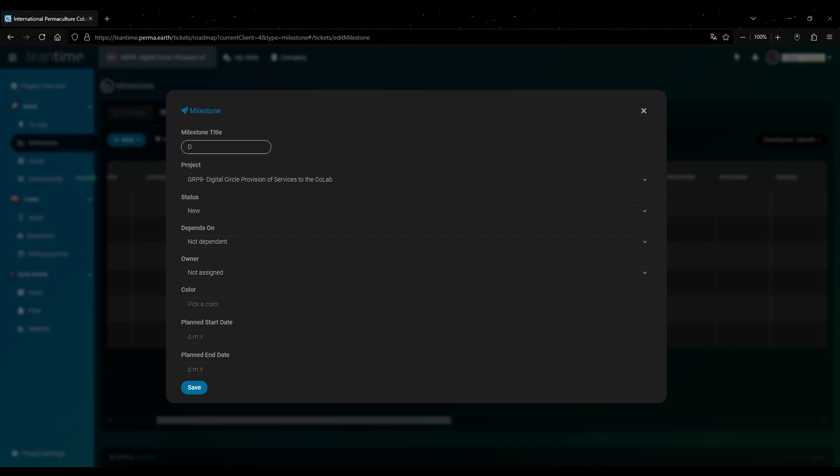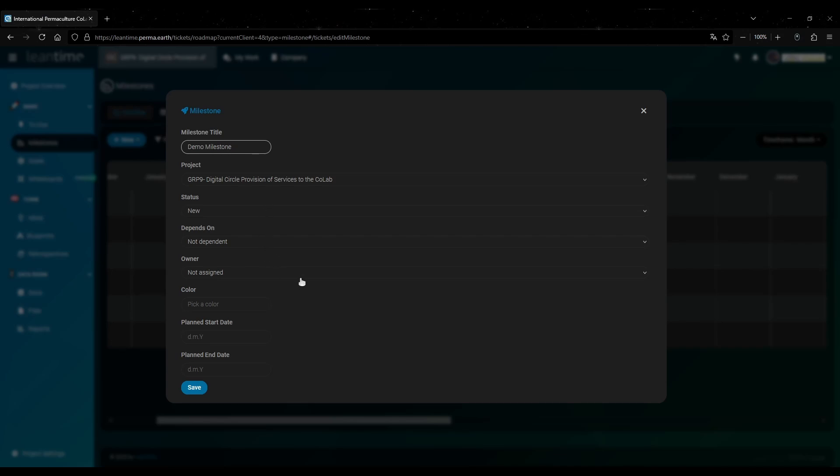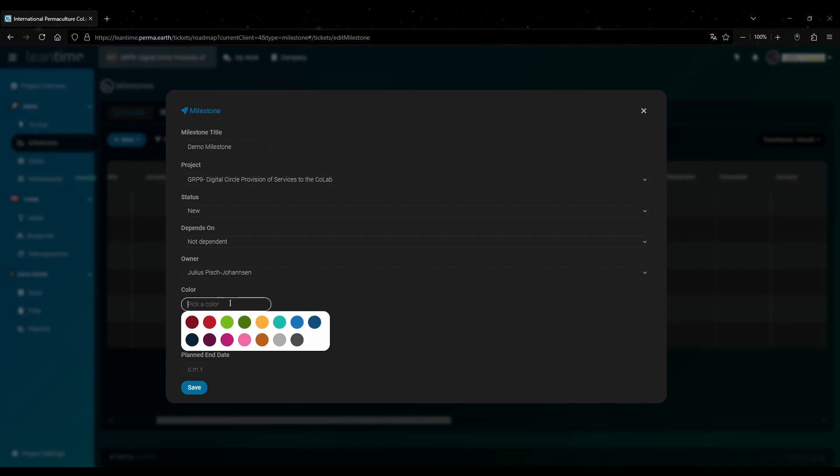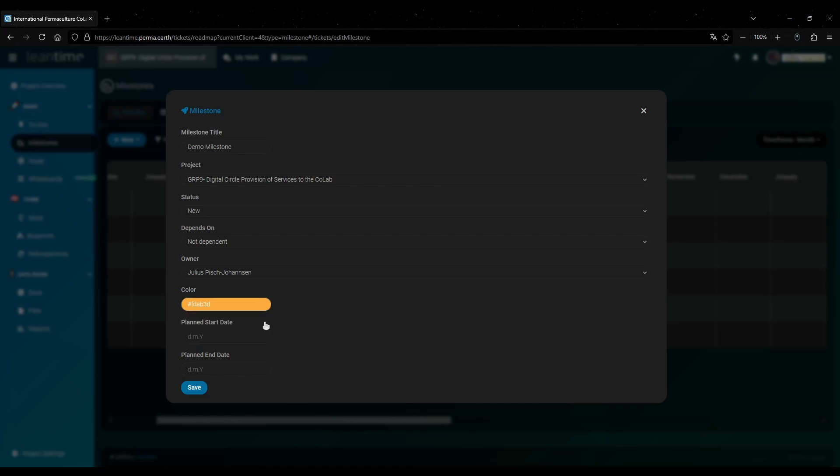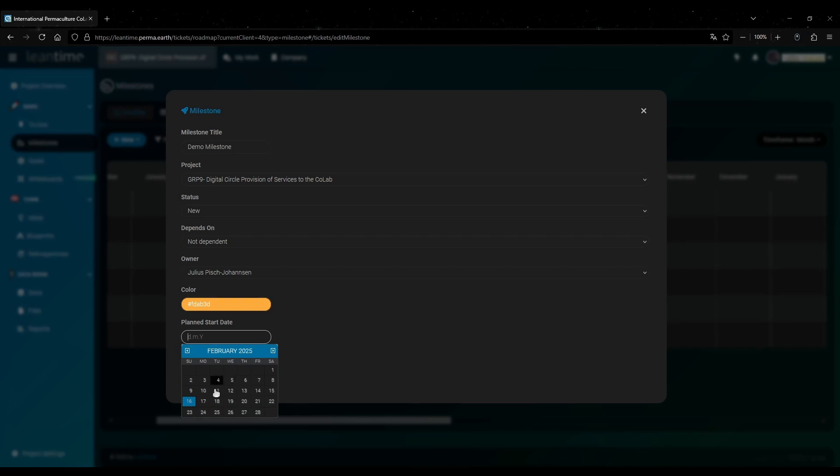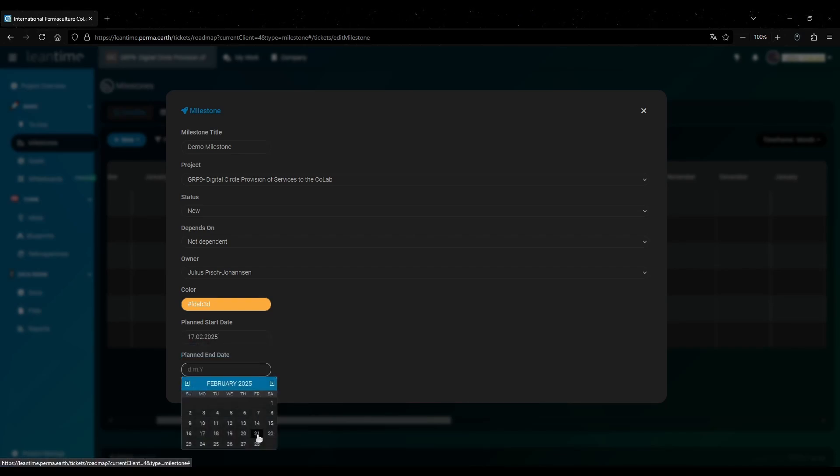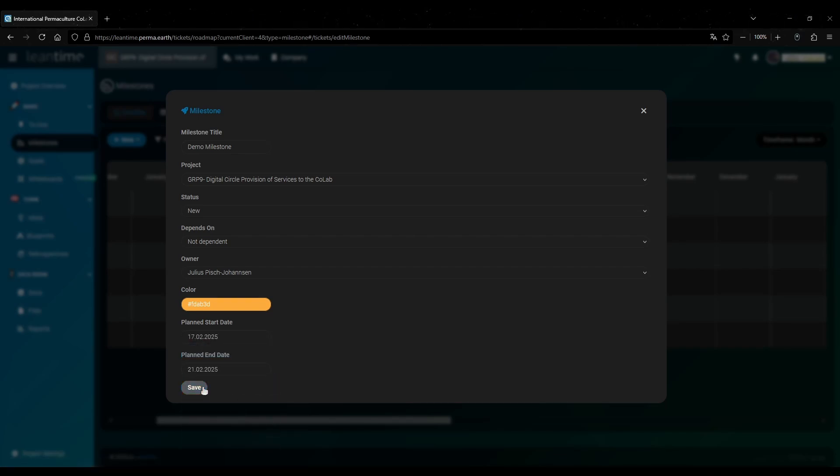Then you give it a name or a title just like a to-do. You can also assign a milestone to someone. I will assign this to myself here. You should also set a different color for every milestone. They will appear with this color in the calendar. Then let's set start and end dates. Let's say it starts on Monday and ends on Friday. And don't forget to click save.